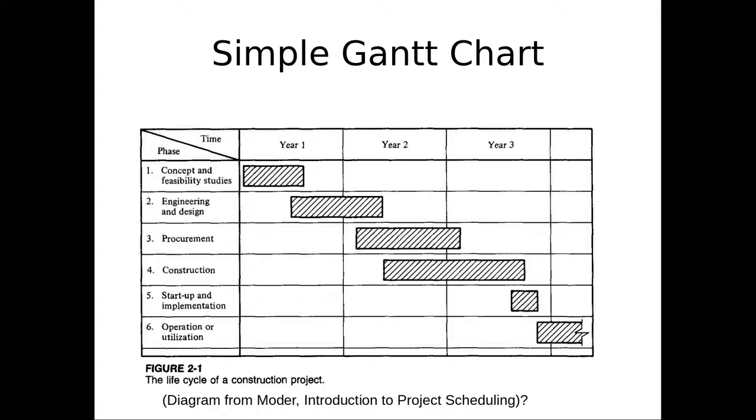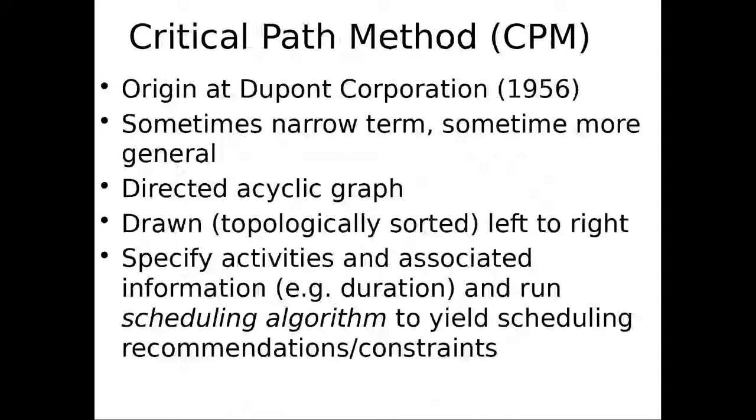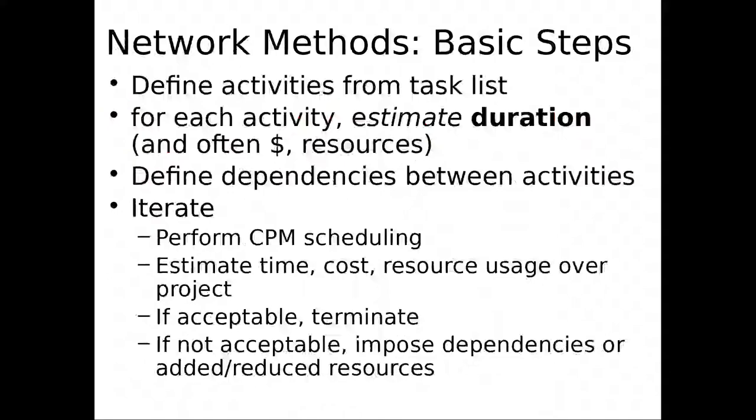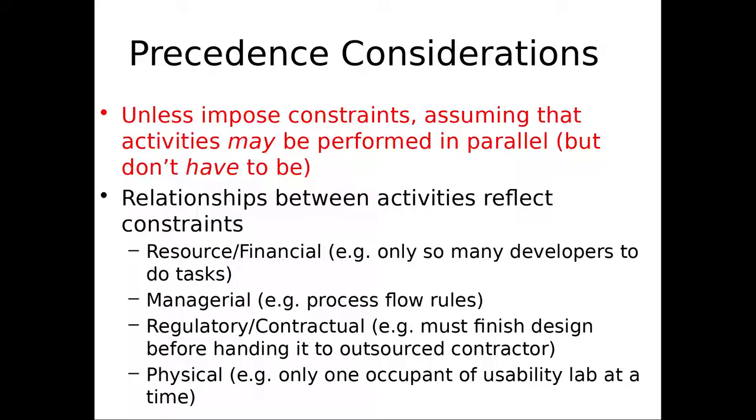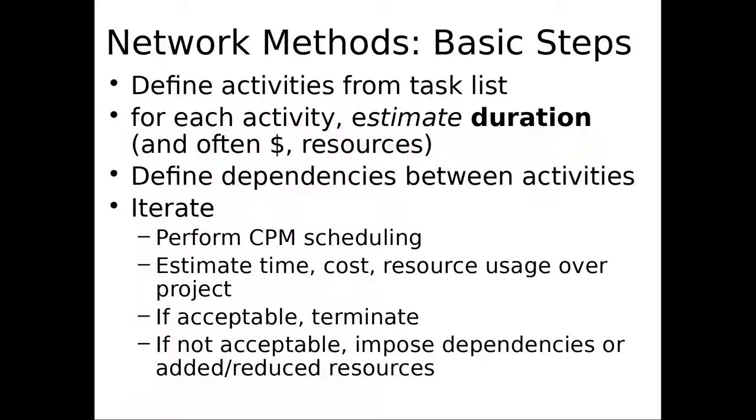early start, early finish, late start, and late finish. Early start and early finish relate to the earliest it can start and finish, given all things that have to be done before it. Late start and late finish relate to the latest it can finish, mark my words, without delaying the whole project. It's a different thing than the early times, okay? So we're going to perform CPM scheduling, and if it's acceptable, terminate.